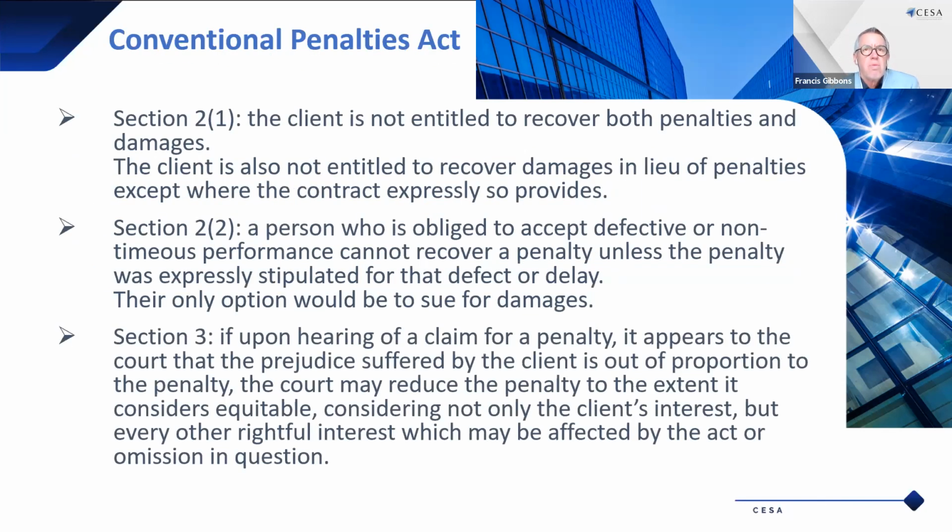Okay, so is there any legal act that protects you in respect of penalties? There is the Conventional Penalties Act, Act number 15 of 1962, so it's been in existence for quite some time. And it's only a one-page act, so it's quite easy to read.